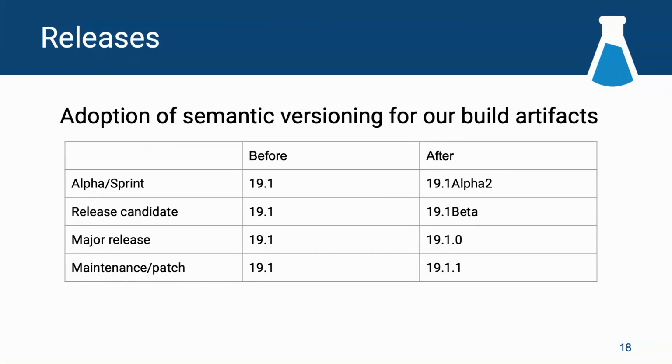we create the release branch. So this is usually at the end of the final month of the release cycle, and then about 2 weeks before we do the formal release. So we're trying to stabilize in that 2-week period. And then finally, the major release, the formal release from here on out, will always be the .0 formal release. And then probably more interesting to everyone is the maintenance releases, formerly the hotfix releases.